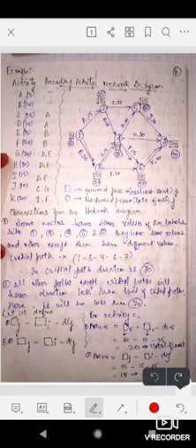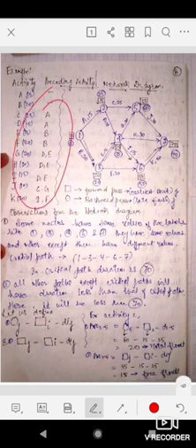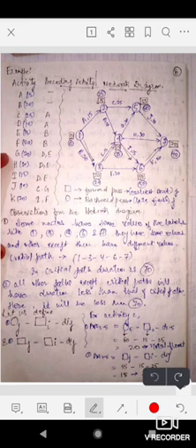See, we had made a precedence relationship depending upon the table, as the values are shown in the table. After that, in the square we are making the forward pass, so in the square make 0. Then come to node 2. At node 2 we complete activity A after 15 days, so we will write 15 here. Then come to node 5. Activity C takes 25 days, so 15 plus 25 will be 40.